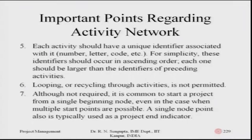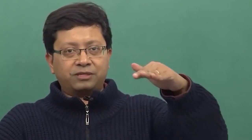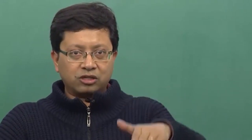Each activity should have a unique identification associated with its numbers or letter code. If the letter code is A, B, C, D they should not be in clash, or if the activities are starting at 1 and 2, other should definitely not clash — 1 and 2 should be unique. For simplicity, this identifier should occur in ascending order; each one should be larger than the identifiers of the preceding activities, so the numbering should go down in a logical sense as we proceed.